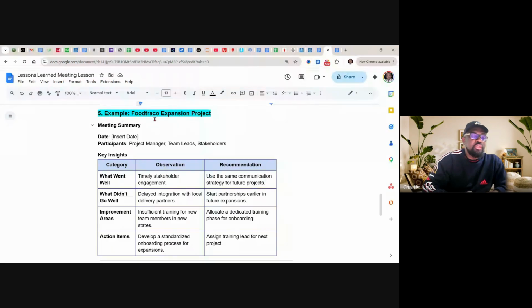This is the name of the project, the meeting summary, the dates, the participants, and the key insights: what went well, what didn't go well, and improvement area and action.